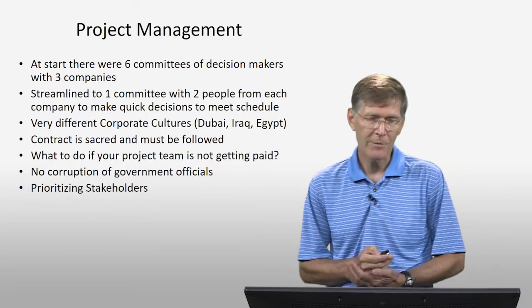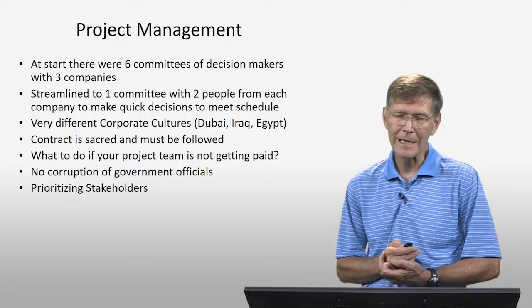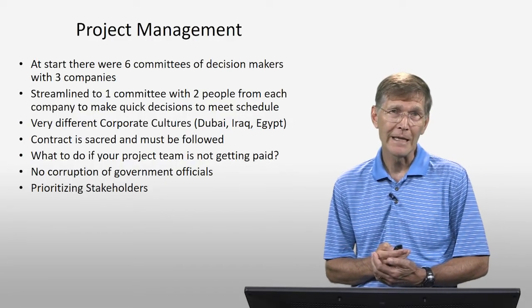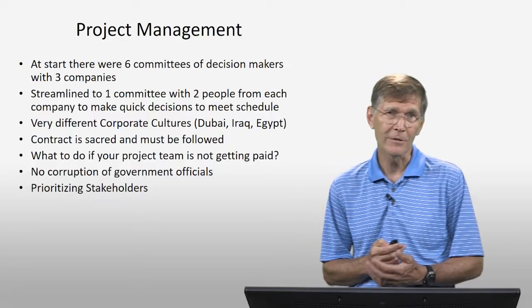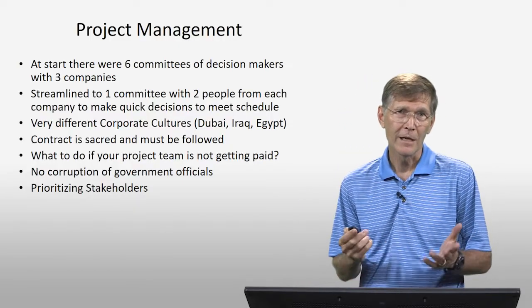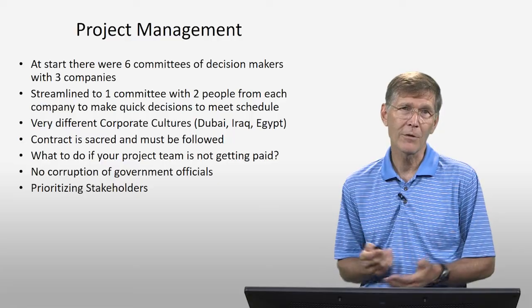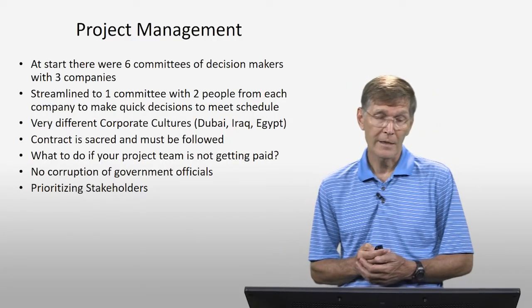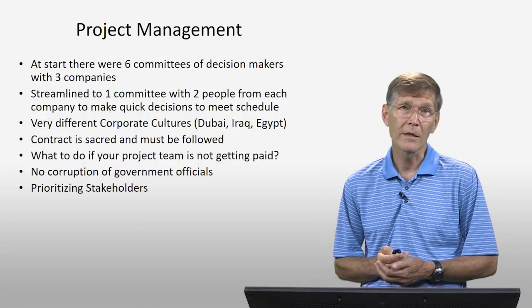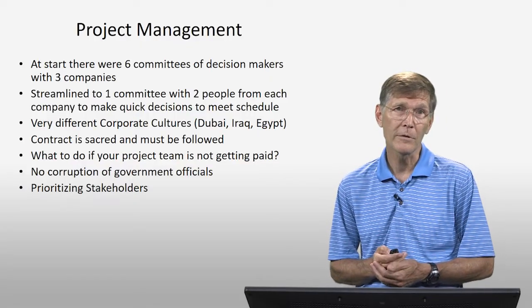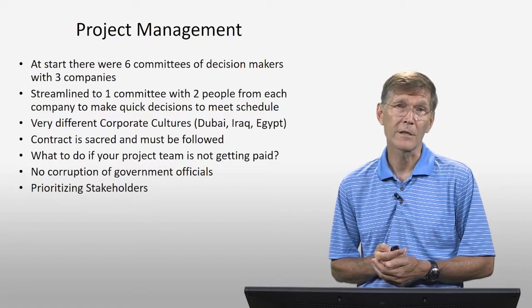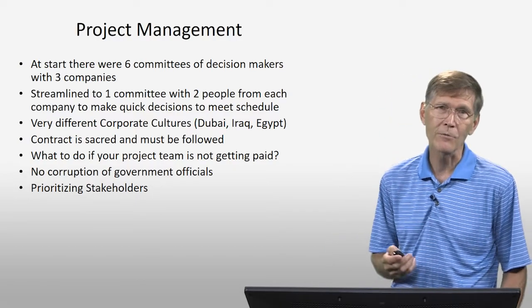Okay, so the project management on this, at the start, there were 6 committees of decision makers with 3 different companies, okay? And that was one of the things that the project manager who was there before me told me, was that he was always in meetings, he always had to meet with all these people, and it just wasn't working. So I sat them down and I said, okay, we're going to streamline this to 1 committee, and I want 2 people from each company so that we can make quick decisions and we can meet our schedule. And of course I met tremendous resistance with this.